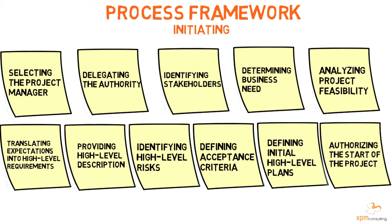Projects should be initiated. Still, many organizations incorrectly skip initiation and jump straight into planning. Some of the symptoms of lack of project initiation are unrealistic constraints, lack of stakeholders' involvement, and constant project changes.